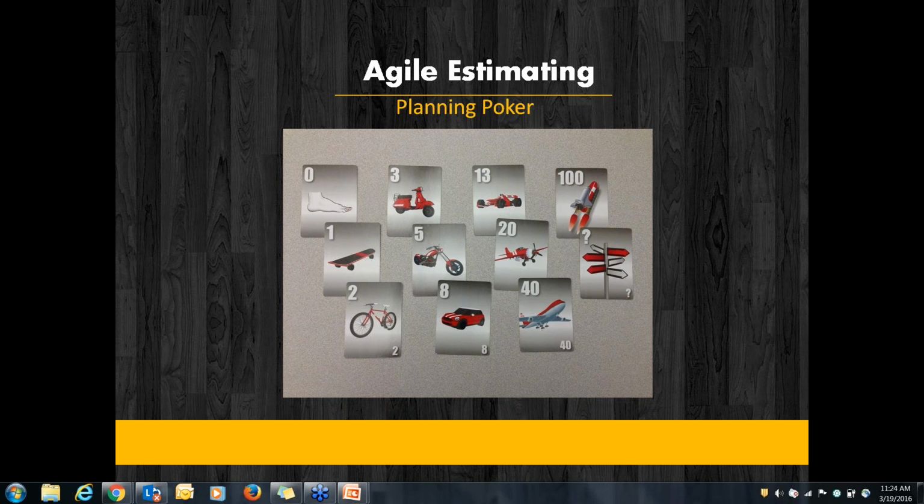And you might give it to the client that the estimate for this particular work is 8 hours. But later, the actual person who is working on it is me, and I am new to the project. I have to find my footing in the project, so my effort would not be 8 hours. It would be 16 hours. So the estimation should have been done by me and not by you.